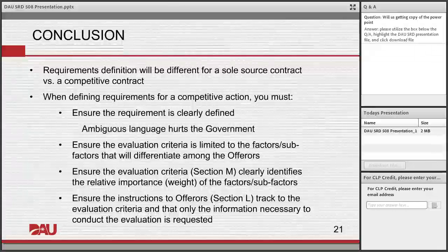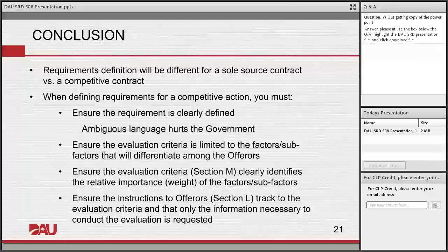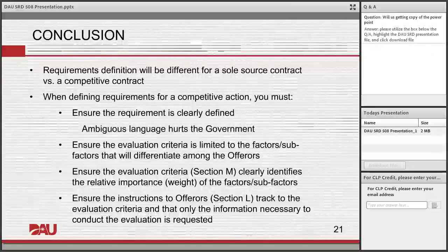We put out the requirement by part number, by NSN, very specific. That is objective. There is no subjectivity to that at all. You either meet it or you don't. In my instance, I got my bids in, I opened the bids publicly, and we awarded to the contractor who was responsible and had the lowest price. I ended up having to T for D, terminate for default. Yes, my very first action, because they could not provide the version at that price. They could have provided me an older version at that price, but they did not meet the need.